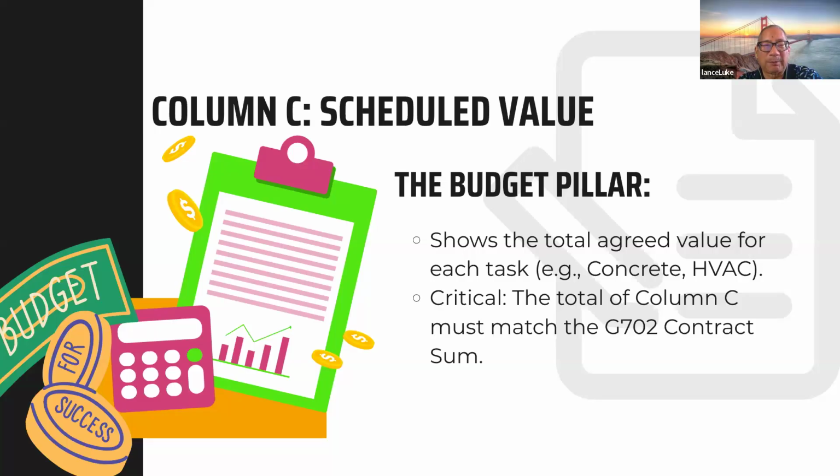So basically, that's how things are. It has to be approved by both parties, otherwise no one's going to pay, or it won't be approved for payment, and then it'll get kicked back. So if there's a construction loan with a construction lender, there's going to be a notation that that amount is not going to be paid unless the lender is provided with documentation that's approved by both parties as to the $20,000 change order. Okay, next.